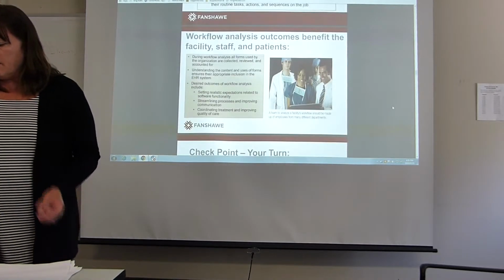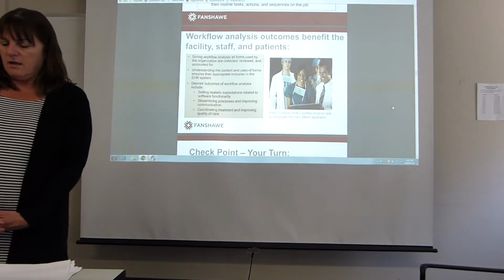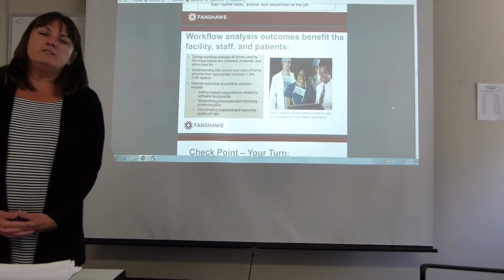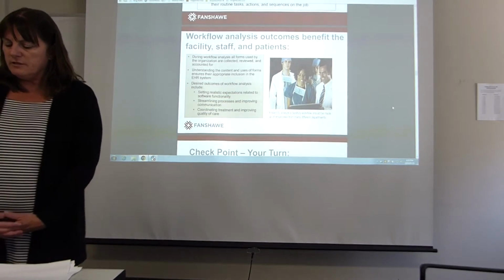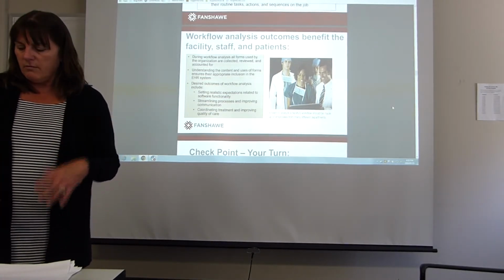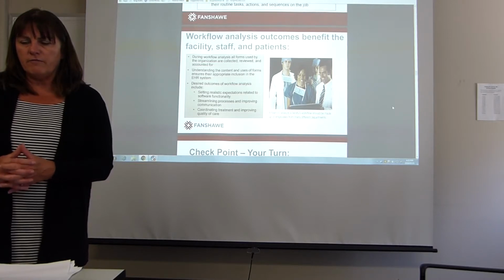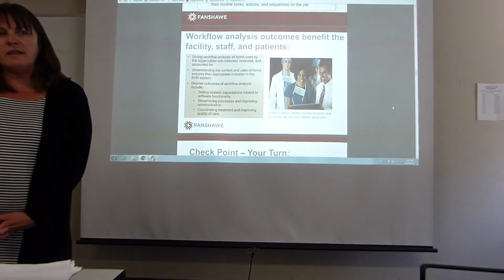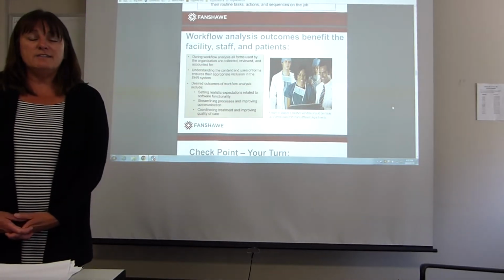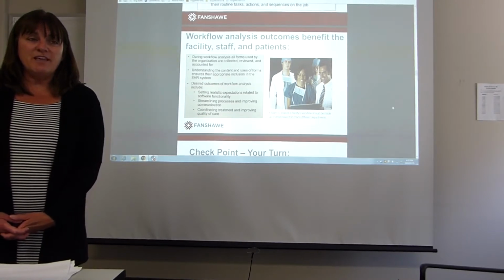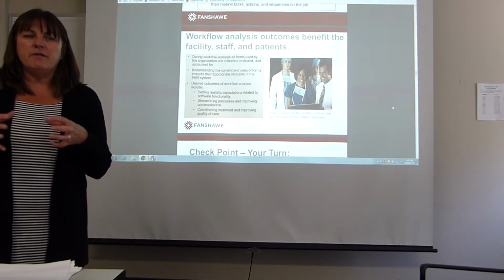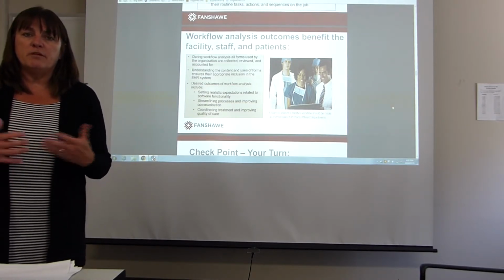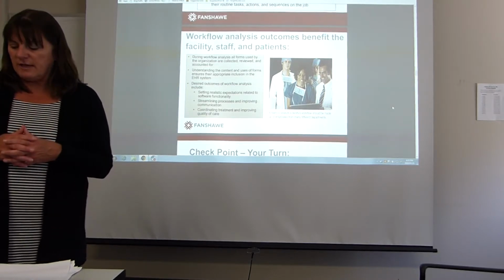The workflow analysis outcomes benefit the facility, staff, and patients. During the workflow, they take a look at all the forms used. So they collect them, they review them, and they ensure that all the forms are accounted for. They understand the content and the uses of the forms, so they need a person in the room asking why. It's often an uncomfortable situation when they ask why, because people tend to be very, very comfortable with the current process, what they do, and they tend to be not as comfortable when people are challenging. But it's so helpful to ask that why.